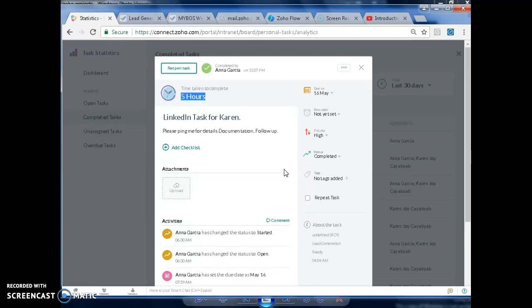So if, for example, you have already created 5 hours of it and then stop and put it on review, then if you put it back and spend another 1 hour on it and then put it back on review for your team leader to take a look at it, and then he marks it complete, he would only be seeing it as 1 hour. So that's gonna be inaccurate in our Gantt chart.